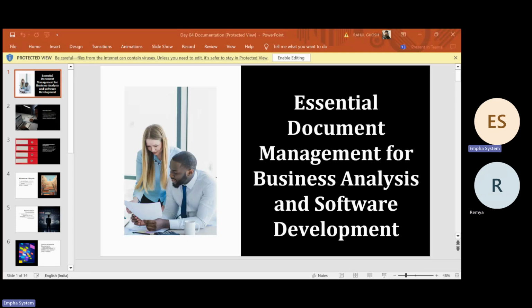So we are discussing requirement analysis, right? Maybe my client is asking, Rahul, can you please bring the moon for me? I would say, no, my moon is for my wife, not for you, right? So yes, they will ask you everything, but you should know, okay, I do have my documentations, I can go over that. If you're asking me to develop anything, this is going to be out of scope. Whatever we discussed initially, anything beyond that is out of scope, and you have to pay extra for that. So again, the documentation is playing a huge role over here, right?